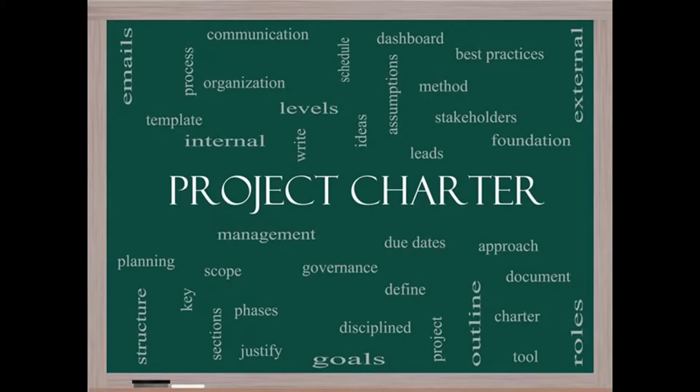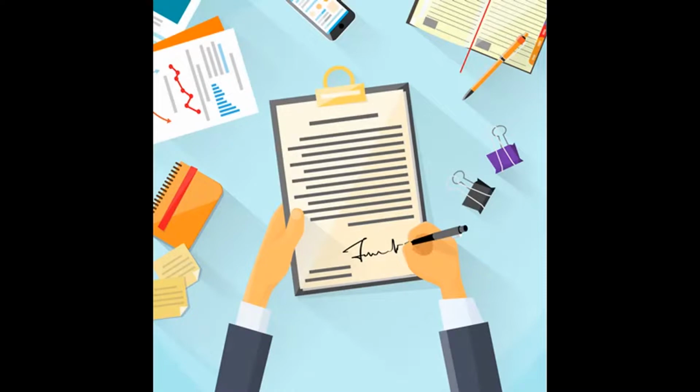Incorrect. Develop project charter is the process of developing a document that formally authorizes the existence of a project and provides the project manager with the authority to apply organizational resources to project activities. The project charter establishes a partnership between the performing and requesting organizations. In the case of external projects, a formal contract is typically the preferred way to establish an agreement. A project charter may still be used to establish internal agreements within an organization to ensure proper delivery under the contract.